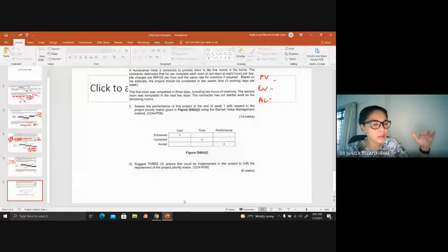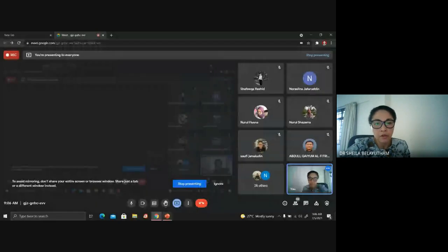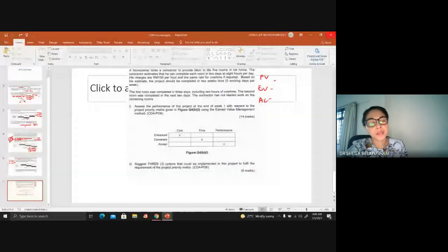So unless you are calculating berapa height of the brick that you have actually completed, so how many houses actually painted and how many layers that have been painted. So rarely that people go into that depth of measuring how much have been completed, lebih kurang. So it will be quite subjective in nature unless you have some project which are very, how to say, easy to actually measure. For example, if you're talking about excavation, so maybe you are calculating based on meter cube. Okay, so how many trucks tippers could equal how many meter cubes? So maybe 7 meter cube trucks.